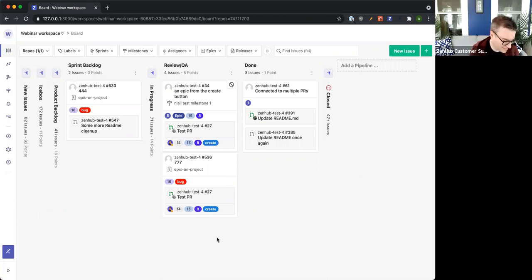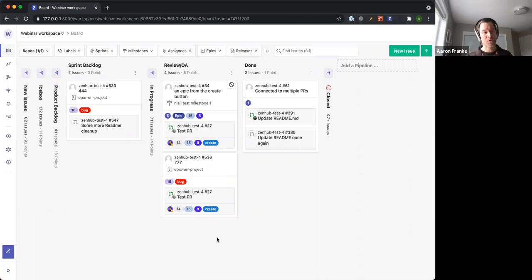And then we take that feedback and, for a case where everyone gives an issue a 1, we just lock in that estimate, and we don't have to discuss it. We don't have to take up everyone's time going through each of those. And then, of course, there are going to be some where we disagree, or there's scope that one person found that another one didn't think about. So in those cases, we do have that meeting, and we have those discussions that we need to have to make sure we can break down the issues correctly and give them a good estimate.